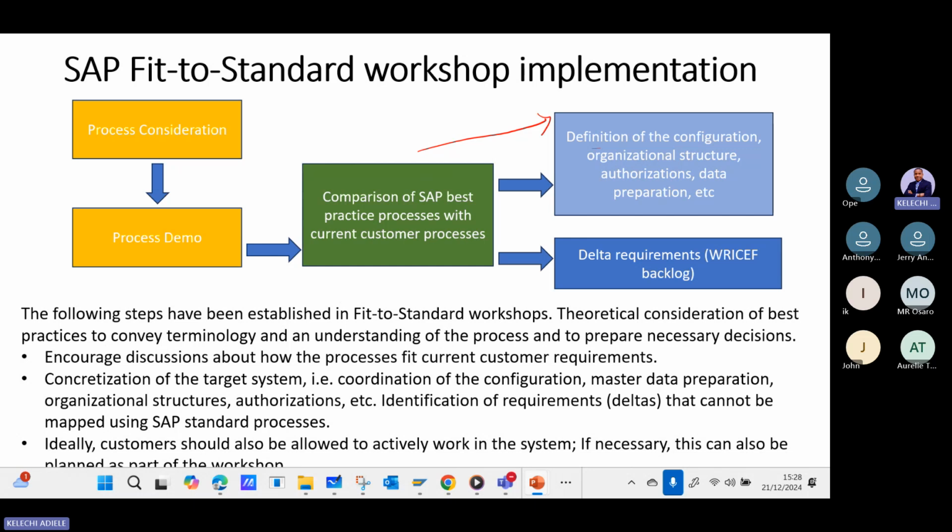It's when that document has been signed off that the functional consultant and technical team will start configuration. They will not sign off your Excel, the Excel you have provided. They won't start working just because the Excel has been signed off or the fit to gap analysis has been done. They will sign off when you have prepared the fit to gap or fit to standard assessment document that will carry everything around this process.